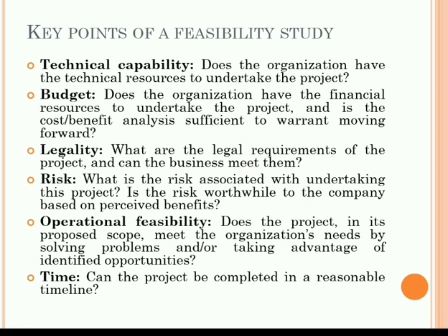Budget. Does the organization have the financial resources to undertake the project, and is the cost benefit analysis sufficient to warrant moving forward? Then legality. What are the legal requirements of the project and can the business meet them? This is studied in the legality feasibility study. Risk. What is the risk associated with undertaking this project? That is studied in this particular feasibility study. Is the risk worthwhile to the company based on the perceived benefits?